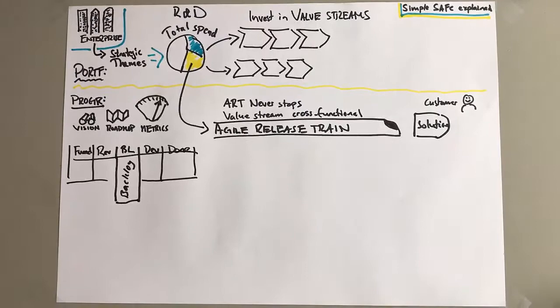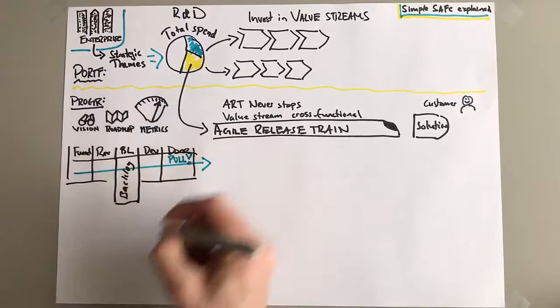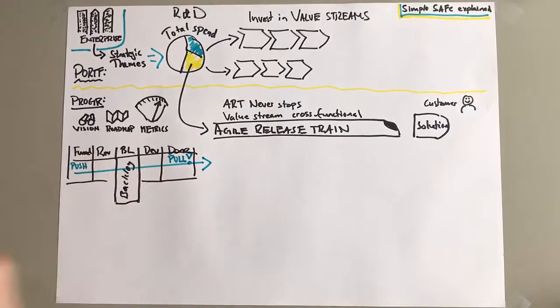So I've done a super simple Kanban here with a funnel, review stage, backlog, development, and done. You will probably have more steps than this. You could have a review and analysis, you could build a business case. You could also do that on a portfolio level. After you develop something, you could have a validate stage. But the important thing is to focus on the flow and to have a pull system.